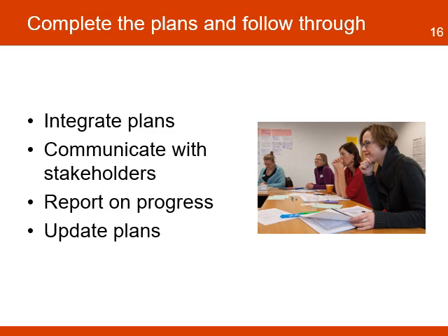Once there is a consensus on the plan, the next and final step is to integrate all plans, communicate to all stakeholders, and follow through with participants during the implementation phase. This is important as it lets them know that the project is making progress. It is good practice to reconvene a follow-up meeting with the participants of the planning session to review the progress made and make any changes or modifications to the plans to improve the performance of the project.